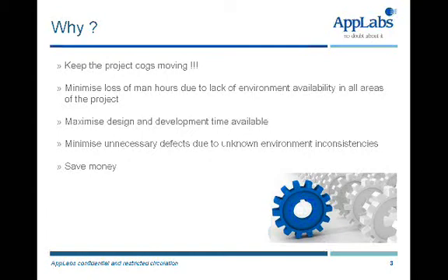To put this in monetary terms, if your project involves just 10 development and support staff, 2 business resources and 5 testers, downtime in the environment they are using could cost you up to £10,000 per day.